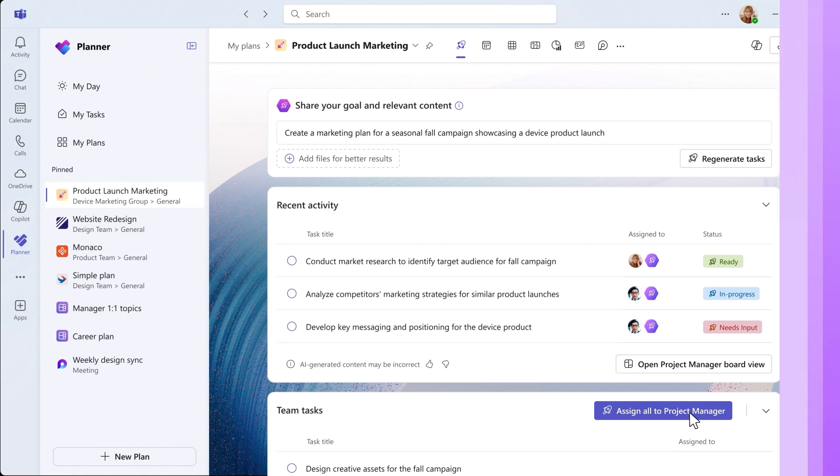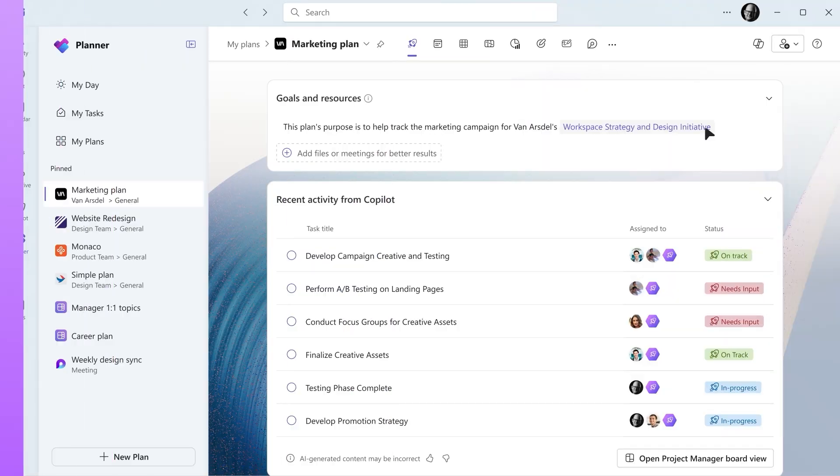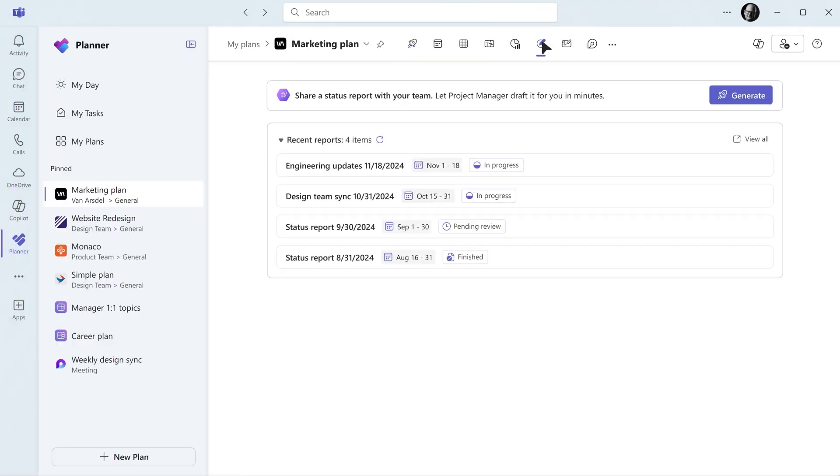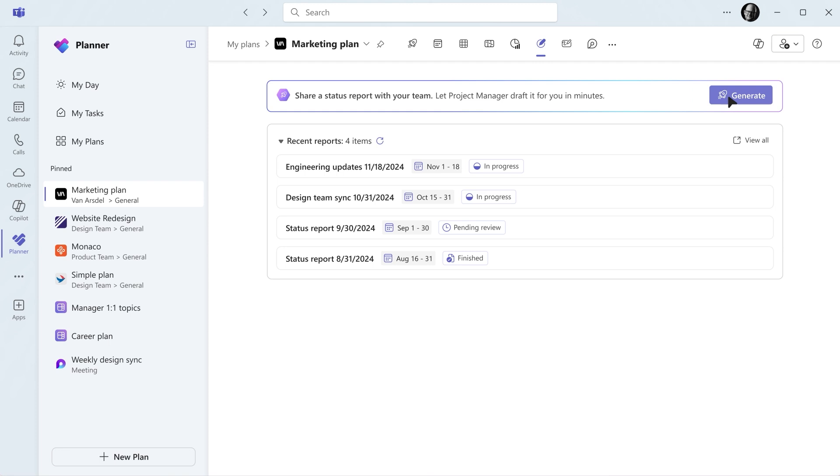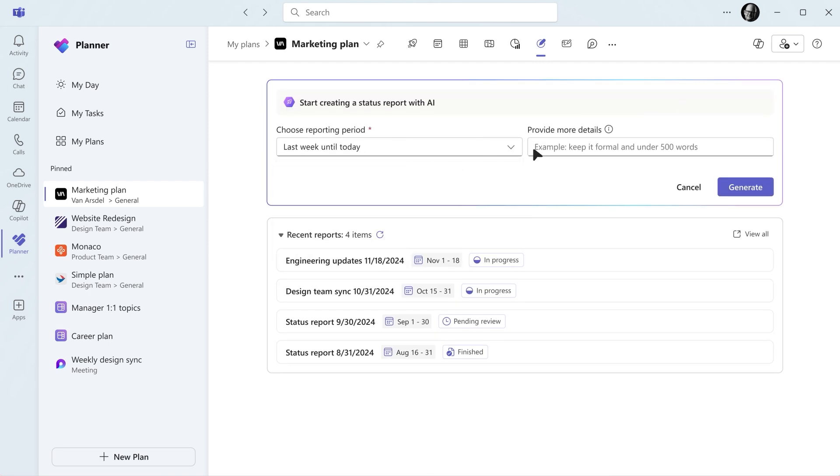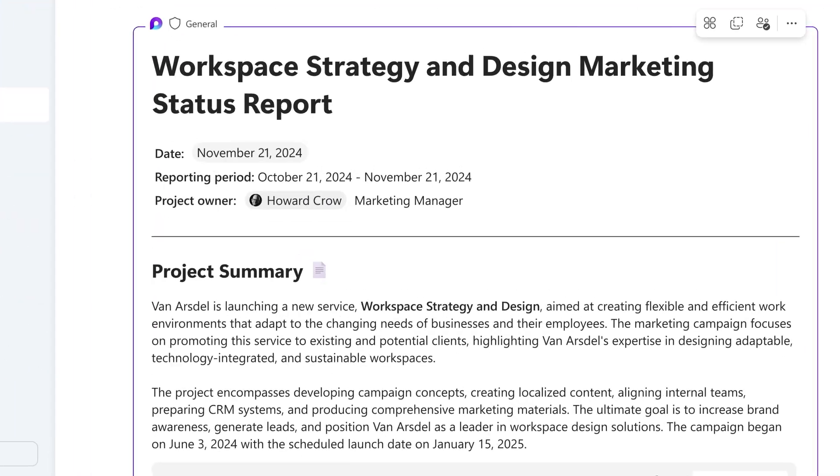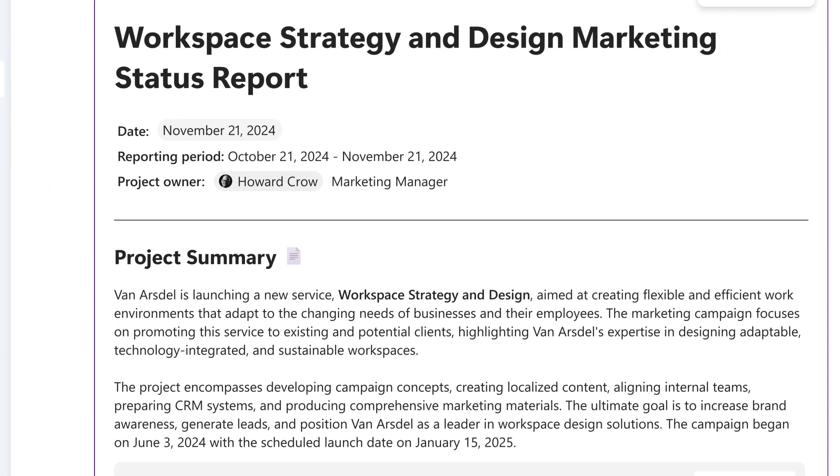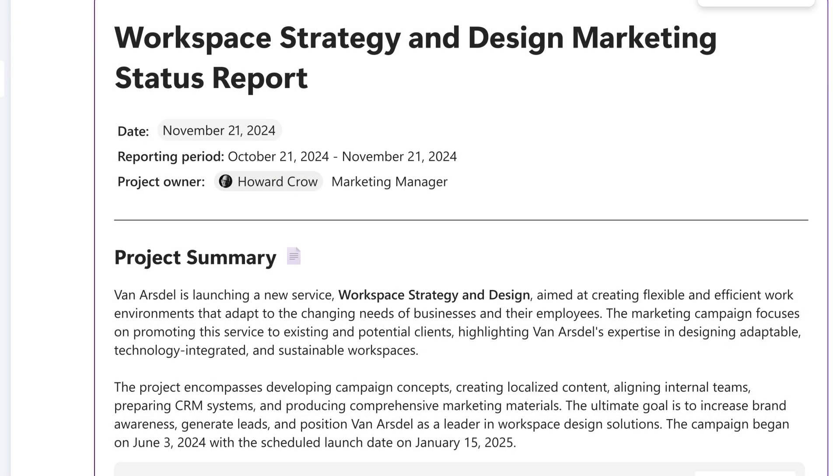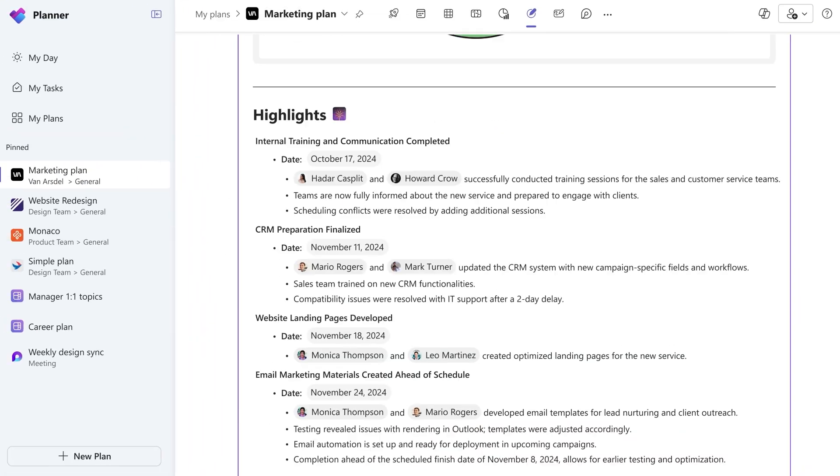The Project Manager can generate a status report for any project in a matter of minutes. Create a new report with your own parameters or use the default ones. Reports include a project summary, reporting period, potential blockers and more.